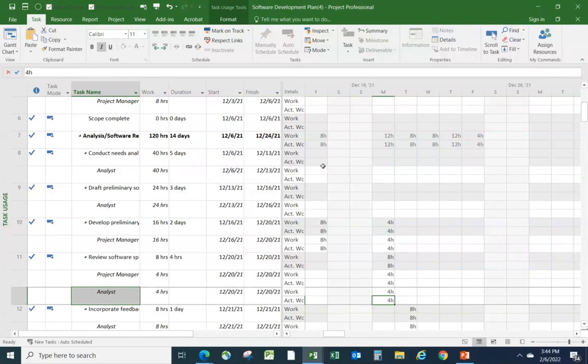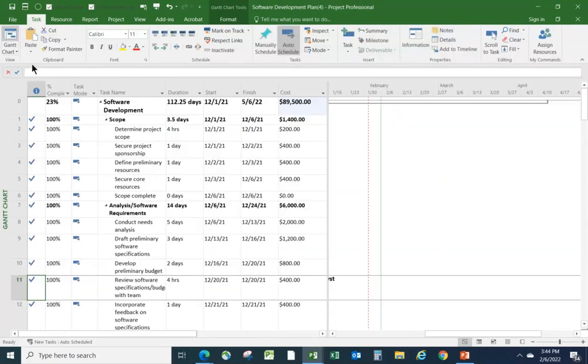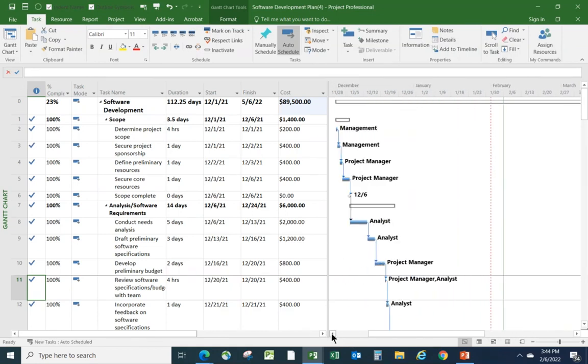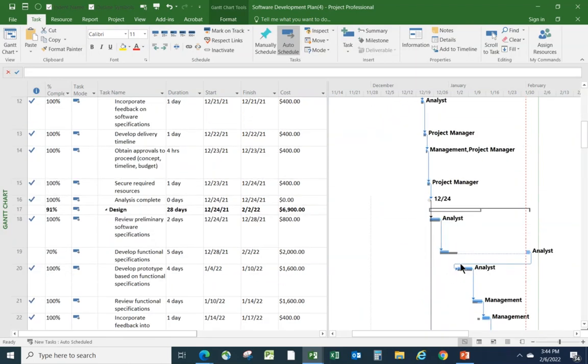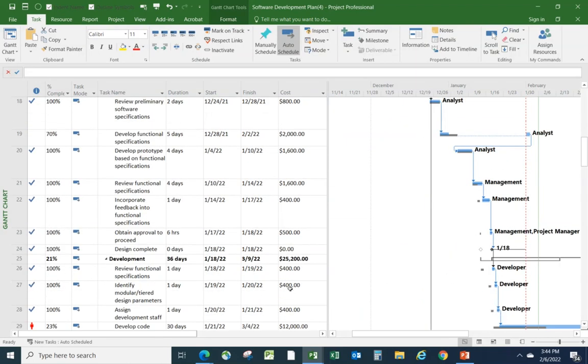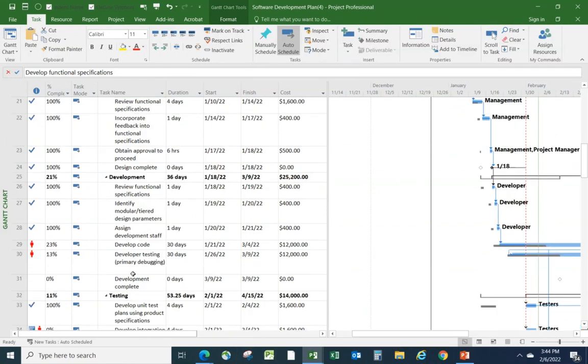At the very least, and let's go back to our Gantt chart, when you are statusing a schedule, show the actual start dates, and any remaining duration beyond what was originally planned. Then when you finish making your updates for a particular task, just click on it and, on the Task tab, say Mark on Track. All of that is better than simply putting in a % complete, but just putting in a % complete is better than not statusing at all.